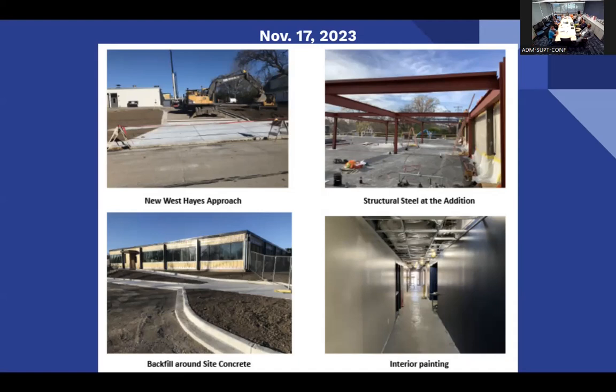There are 2 layers of spray foam insulation, both on the exterior behind the metal panels and again on the interior. And then the L&L addition, that building was designed to go vertical. So here we're setting our steel. We hadn't torn off the former roof, but we tied into the steel down below. Once we put this roof on, then we tore that roof off, because that was a major challenge in this job. The server room sits right here, so keeping that watertight the whole time was very important.